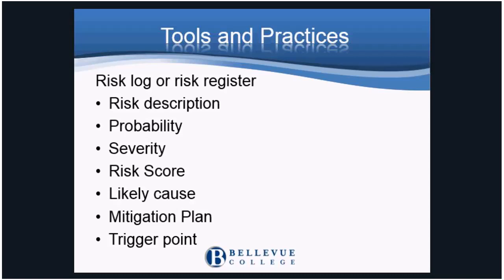The next part of the risk log is a mitigation plan, what we'll do if the risk is encountered and if there's funds to get things back on track. To be proactive, an early warning system for risk includes a trigger point for detection before the risk becomes unmanageable.